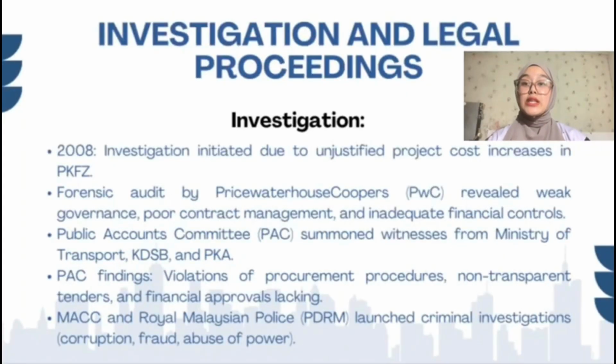Okay, next, I will talk about the investigation and legal proceedings that the government has conducted. The investigation in 2008 was initiated due to the unjustified increase in project cost of PKFZ. A forensic audit by PricewaterhouseCoopers (PwC) revealed weak governance, poor contract management, and inadequate financial control.